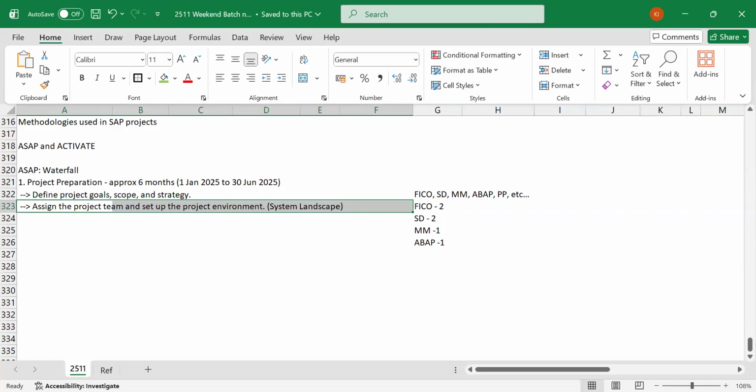Somebody left a job and they're ready to join whenever you interview. There can be multiple categories. Considering the maximum time frame, maximum is like a 3 months notice period, maybe plus or minus 10-15 days they will add to that, say total 100 days. Within 100 days, we need to finish this project setup.